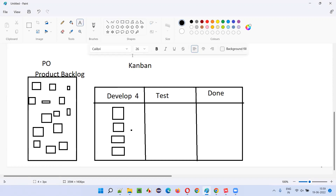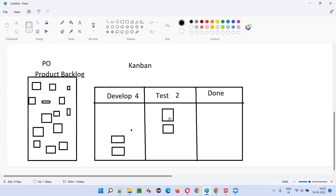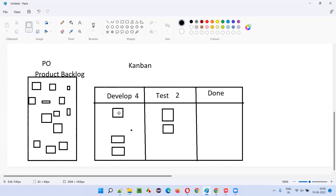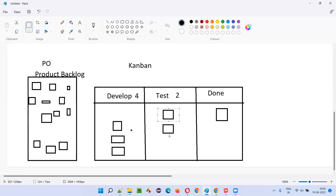Let's say there is only one tester, so the test limit is two — only two items can be tested at a time. After the development team completes two high-priority items and moves them to the test column, there is now a vacancy in development. Since the limit is four but only two remain, they will pull more items from the product backlog. At a time, only four will be in development. If any vacancies appear, items are pulled from the backlog.